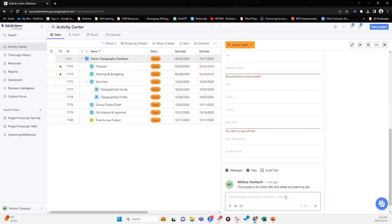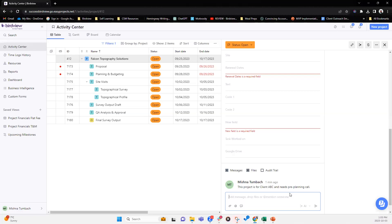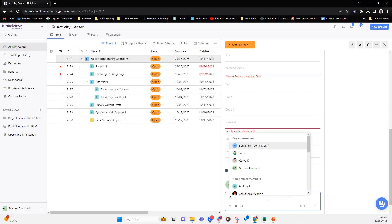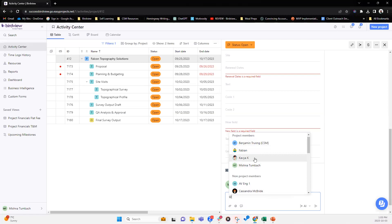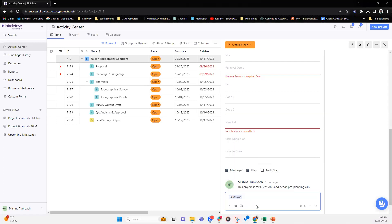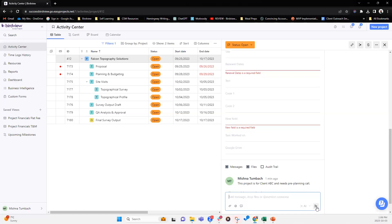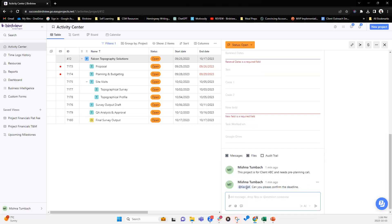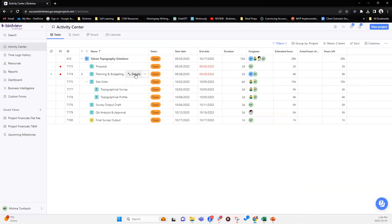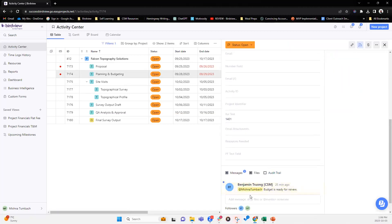So next is mentions. When we have multiple users at the task or project levels, when we create, type a message and send it, it's going to get sent to everybody who is assigned to that activity. However, if I use at mention here, these are my project members and I want to interact with this individual Kavya, and I'm going to say, can you please confirm the deadline? And I say send. So what's going to happen is Kavya is going to get an email as well as a notification in her center saying that Kavya, you have been mentioned in a project, in a task.